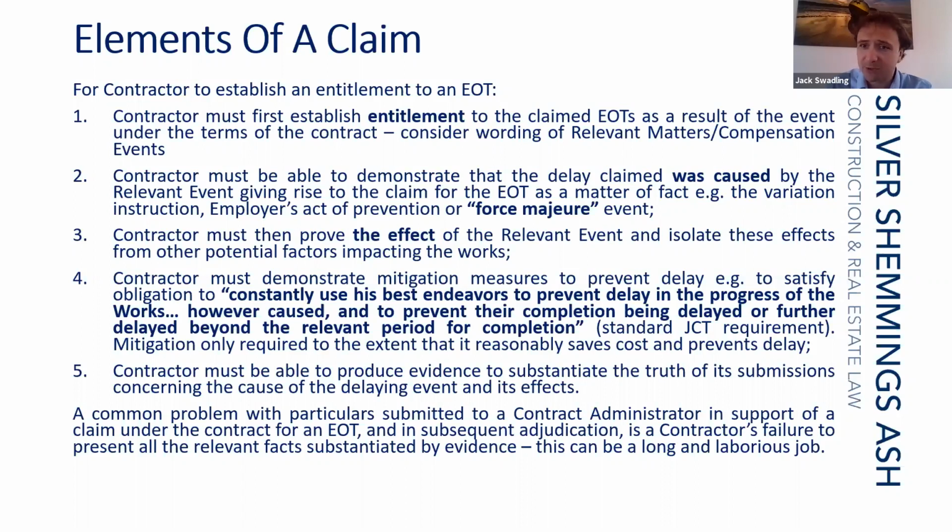Again, this is a matter of proving facts, and this will almost invariably be based on site records that have been maintained whilst the works are being carried out. Fourth, the contractor after that must be able to demonstrate what they have done in order to prevent delay. The contractor, irrespective of anything else, will have a general obligation to mitigate the effect of a delay event in common law.